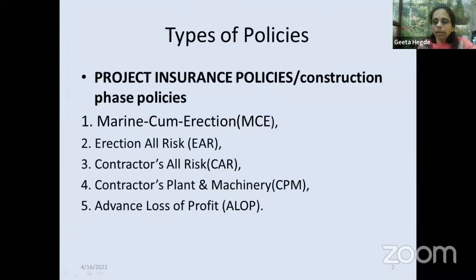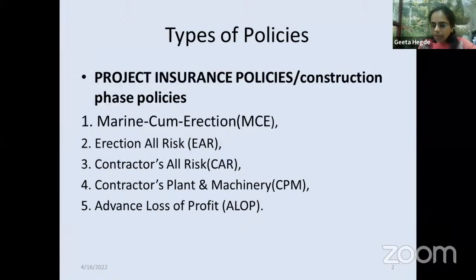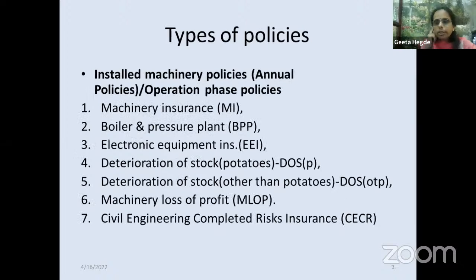Types of policies in engineering are project insurance policies, or what we call construction phase policies: marine cum erection, erection all risk, contractor all risk, CPM, advanced loss of profit. These are the construction phase policies. The other classification is the operational phase policies. Policies prior to operation are construction phase policies, and policies after the construction or erection starts are the operation phase policies, mostly annual policies, or installed machinery policies.